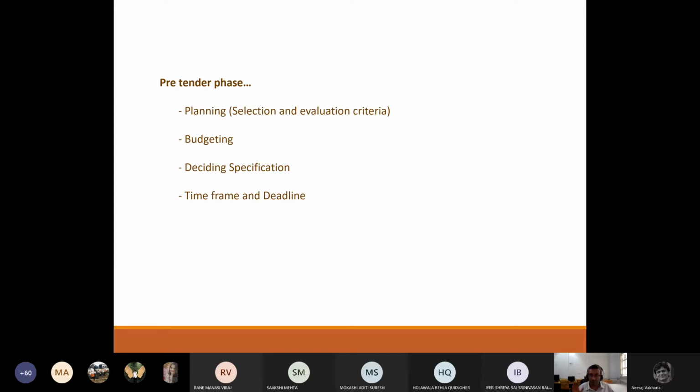So in order that you don't go drastically wrong, you usually fill in the tender yourself. You fill in the rates and see the estimated cost of the project. You are not going to execute it, being the architect, but you are in the right position, first of all, to provide the right picture to your client.